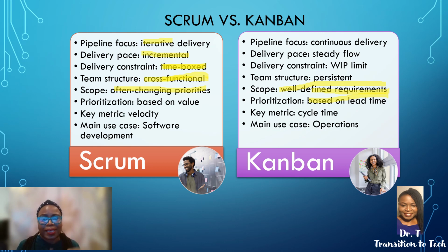And here's where we look at how fast we get work items through our workflow, and how quickly they are moving from each state. That key metric tells the team and tells leadership that this team is working without any bottlenecks. They have the right WIP limits to keep that work flowing, and there's limited ambiguity in getting the work done. So cycle time is a key metric for Kanban.